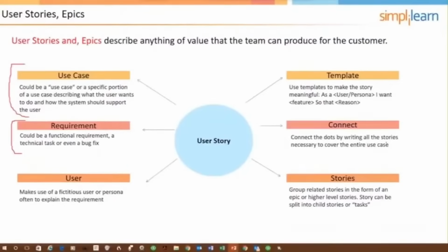So I'm going to go back to the whiteboard, and a product backlog is going to have a lot of user stories that come from the customer, right? Whatever the customer wants done. But the team may know that it has to do some development work in order for the user stories to even be able to work. There's some system level non-functional requirements that need to be done. And so there could be tech user stories. And then, can you see this? I can't see your chats, but then there could also be defect user stories. There could even be risk user stories.